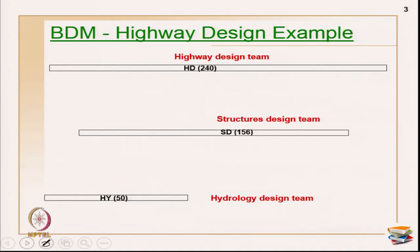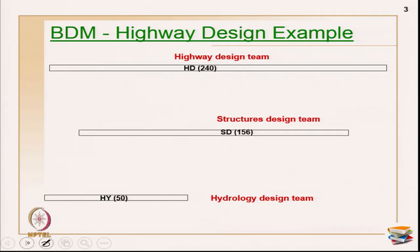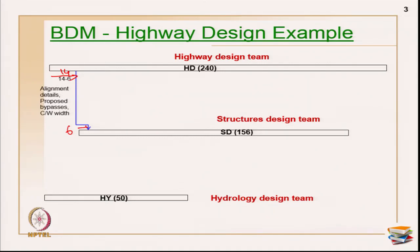I am taking a highway design case. There are three teams here — this is a truncated example just to showcase the relationships that travel across the three teams. The highway design team was on the project for 240 days, the structures design team spent 156 days, and the hydrology design team spent almost 50 days on the whole project. Now, the first link is 14–6, which implies from the predecessor the information release time is 14 and the time at which it is reaching the structures design team is 6. The information that travelled is alignment details, proposed bypasses, and the cross-section width — these are the information which reached the structures design team.